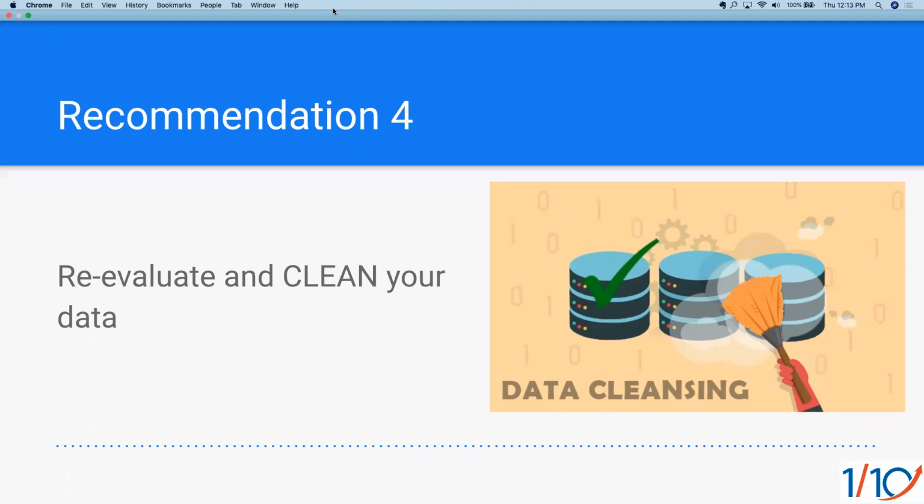So reevaluating the data that you want to bring over. Do I need 18 years of giving history, or maybe just the last 5 years is sufficient? So you want to think to yourself before you have this very complex migration process, what is the most relevant data you need in your system to provide useful information back to you? If it doesn't really meet any of those criteria and it's just data that you want to move over because you have it, you might want to rethink that.